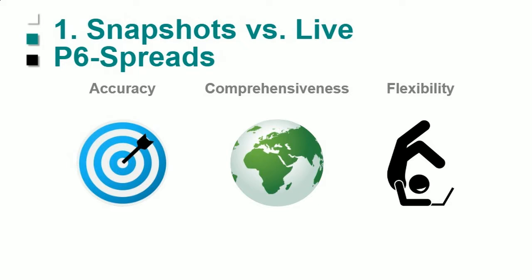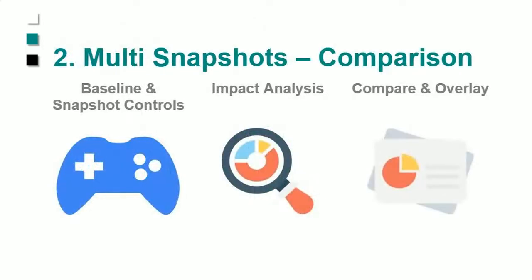So we've got all the data, and that makes it more flexible when you're outputting to your reporting engine. Now, we have the ability to have multiple snapshots. That's something Marilyn will show you. It's not just a baseline, but a snapshot, because not every single update necessarily needs to be a baseline. But users of P6 make them baselines because that's the only way they can really look at them. That limitation we have in P6 goes away with multiple snapshots.